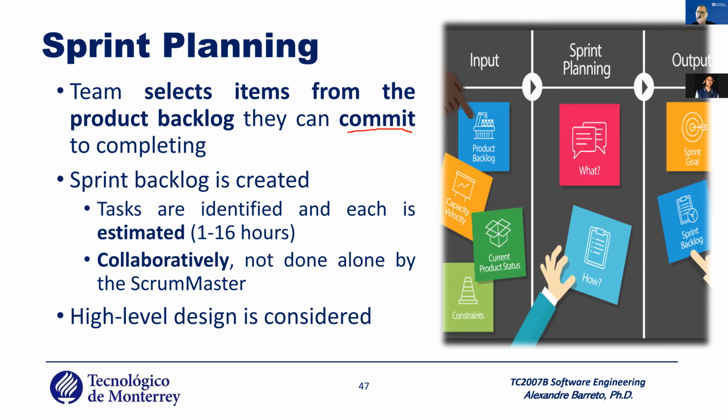It's a common error in Scrum, common at the beginning of the project, but you need to solve this problem during the sprints: during planning, you define more tasks than it is possible to work. For example, you define that you work on 3 user stories. However, at the end of the sprint, you worked on only 1 user story.